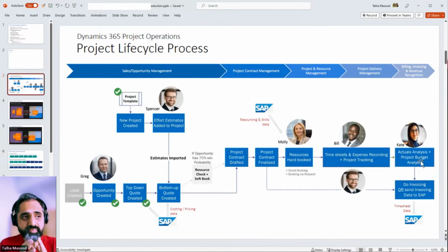And by the way, most of the projects, at least in the IT industry, and actually some other industries here in Australia as well, there's a concept of time and labor projects versus fixed price projects. I think you also need to understand that. The time and labor projects are more like, okay, same example, a 425K project that will be taking 3 months. My agreement with my customer is that every month, for the amount of time already consumed, I will bill you for that.